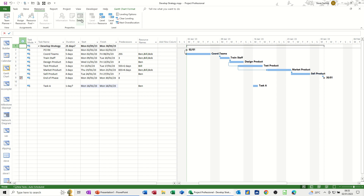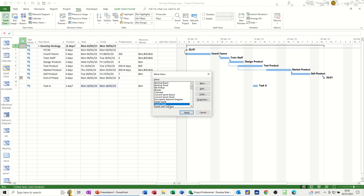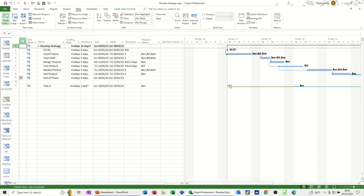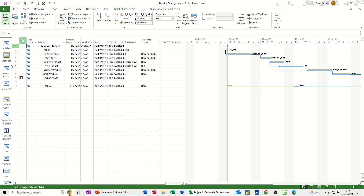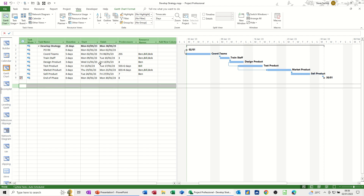There is a view you can have a look at. Go to View, Other Views, More Views — it's called a Leveling Gantt. It tells you where a task started from and where it's moved to. You can see the pre-leveled task position and then where it moved to. You can't just let everything shift without knowing where things went. That's the Leveling Gantt — and you can see it's now appeared in this view bar. I'm just going to delete Task A off at the bottom — I don't want that.